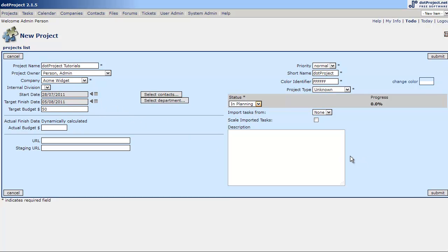So if you have a start date of 7/28, for instance, your template obviously has dates assigned to it. Maybe you created the template in March and now you're in July and you're doing the project in August, so you don't want March dates in there. So hitting scale will move your dates around, hopefully as close as it can, I think.